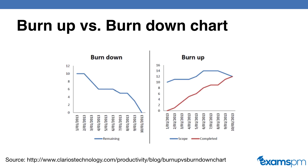Looking at this chart here, on the left-hand side we have the burn-down chart, and we can see how much work we have already completed to show us how much work we have remaining. On the flip side, the burn-up chart shows you how much work we have done and how much work we still have to do in order to complete the project. This is the burn-up and burn-down chart for the same project.